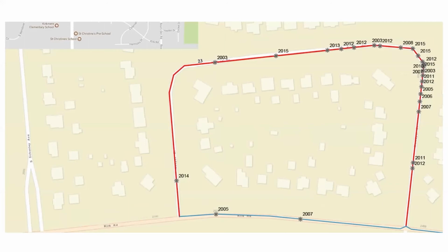This is the other really problematic section in there. There's 23 breaks in 14 years. Most of those are localized up in the upper hand corner. And further development of this map, maybe adding cost per mile information in the database, would help more easily facilitate that sort of robust and targeted capital improvement plan. And maybe, ideally you'd replace this entire section, but if you didn't have enough money to do that, well, you can tell from this, I need to focus on that northeast corner. And if I attack that, I'll probably knock my number of breaks down significantly.